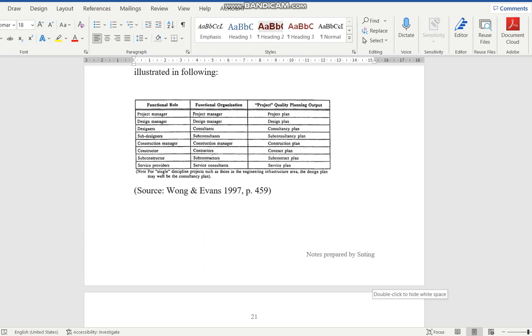A lot of people in the construction environment, when they do a PQP, like to do specifications, but it should not be just specifications. They treat PQP or QMP as a specification. It should be the entire procedure, starting from processes, the procedures, and from the procedures to the resources requirement, the testing requirement, the acceptance criteria. It's all listed in a flow chart kind of manner. And if it fails, then what do you do next? It's like a plan B, plan C, in order for you to deliver that product. So you must have that process.